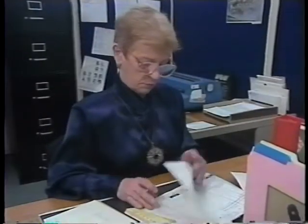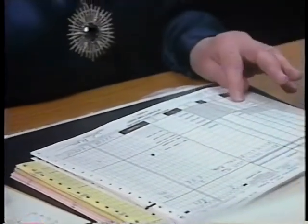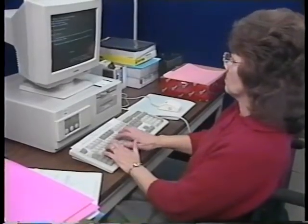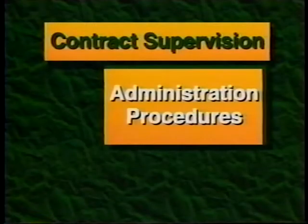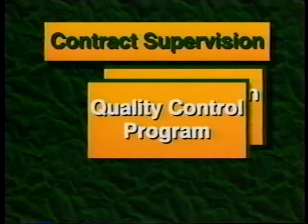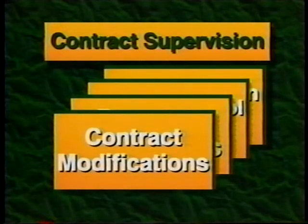At the same time as some agency people are going through the solicitation and award process, others should be finalizing the contract supervision procedures. These procedures must be ready when the award is made to a contractor. They include administration procedures, quality control program, payment procedures, contract modifications, and training.